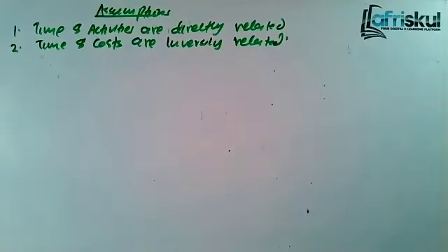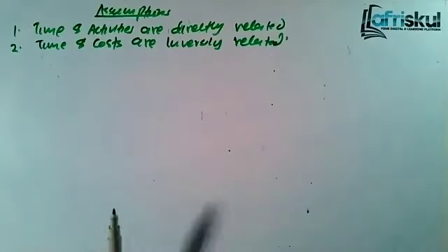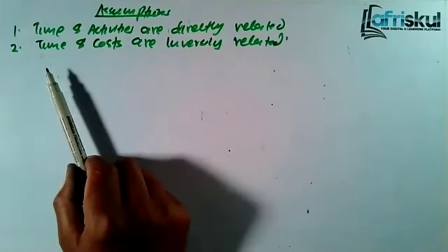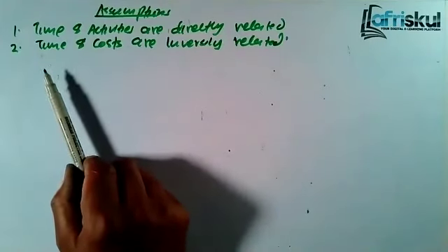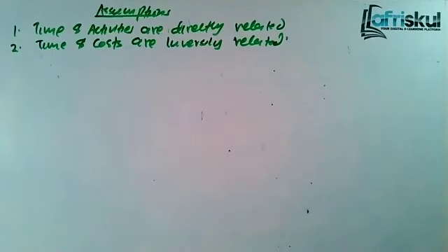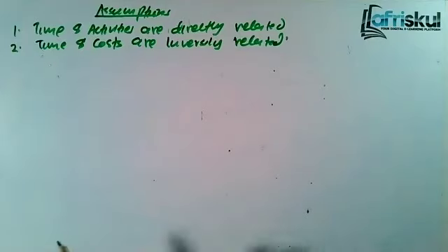We have said that crashing involves reducing the time so that you can complete faster. But in this case, if the time goes down, the cost will go up, because maybe you have to pay that person an extra amount, let's assume you are doing overtime. Overtime actually comes with an overtime cost. If you're hiring another person or personnel, you have to incur another cost. So time and cost are inversely related.